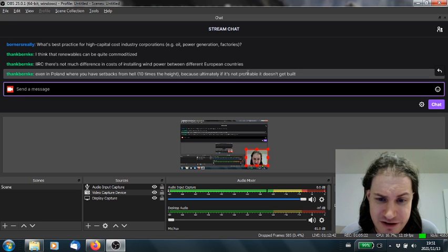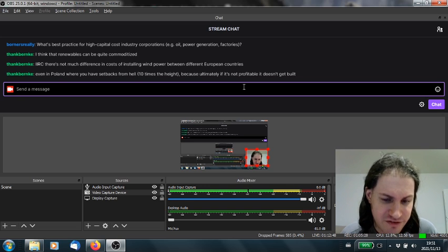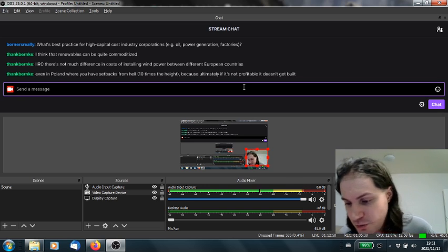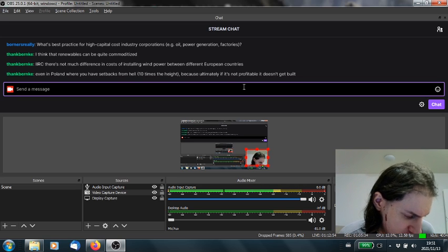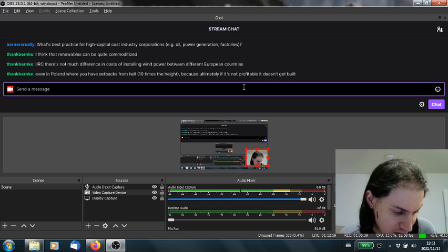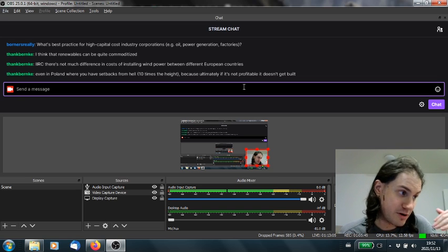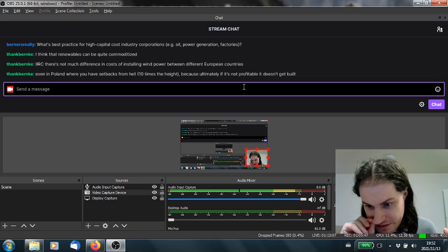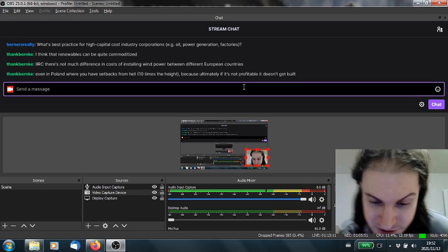So in Britain, the costs are higher. I think it's a 1-2 spread between cheapest and most expensive, if I remember correctly. And it tracks infrastructure construction costs decently well. It's just not the 1-6 or 1-5 spread that you see for subways. Because things that are very commoditized, you can very easily do design build because there's going to be a very thick market of bidders. Things that are very bespoke, you're not going to. So you need a very large market.